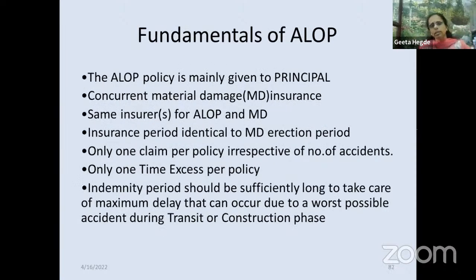Now, if you see this slide, you will know the fundamentals of ALOP. ALOP policy is mainly given to the principal. Concurrent material damage insurance has to be there. Same insurer for ALOP and MD. Insurance period identical to the erection period. Only one claim under the policy, irrespective of the number of incidents. Only one time excess because there will be only one loss. There cannot be many losses under an ALOP policy. But under your FLOP or MLOP, there can be more than one claim under a policy.